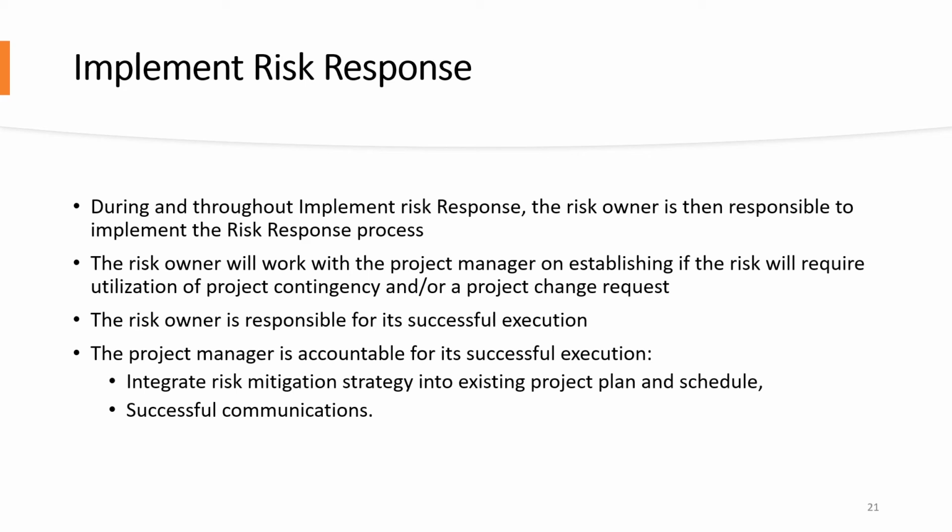bringing us 3 days over our completion date. Assuming this deliverable is on the critical path and we did not get a change approved, via the example alone, we learned 2 things are essential to implementation of risk response: communications and execution of schedule. If Robert maintained constant communications with the vendor after the ISP contract execution and ensured to communicate the date of April 22nd based on the review of this project plan, this project would likely not be at risk of missing the planned completion date. Now this project will likely need schedule compression techniques to get back on track.